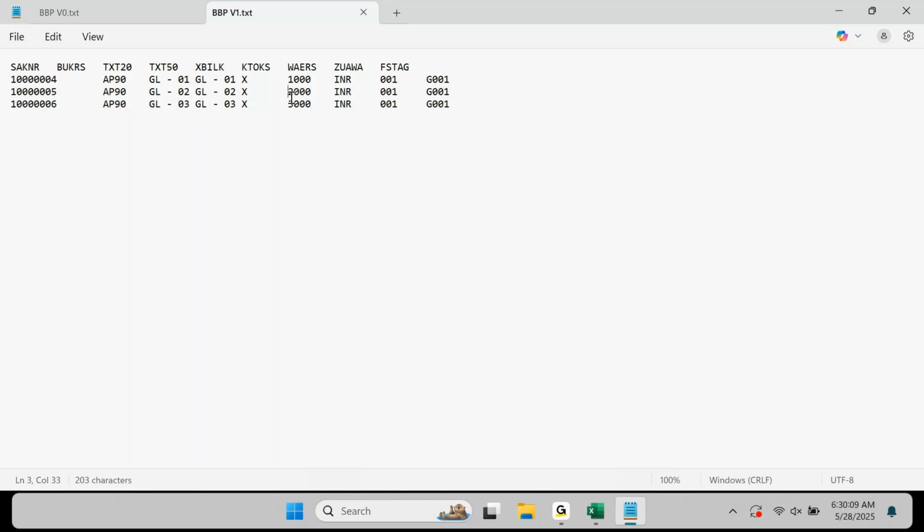Likewise, by the time you get your blueprint signed off, by the time you get your blueprint confirmed, maybe 5 versions, maybe 10 versions, maybe 15 versions, maybe 20 versions. Until you receive the sign off approval from the client on the blueprint or on the solution design document, you have to keep revising the document. And in every document, you need to ensure what changes are made. Agree? Yes, sir.